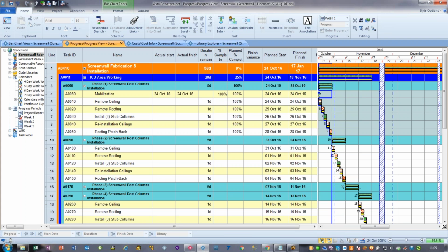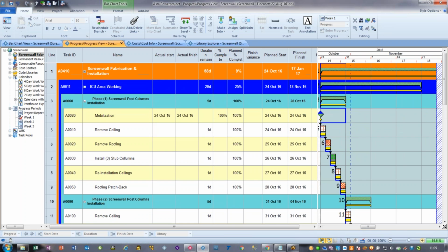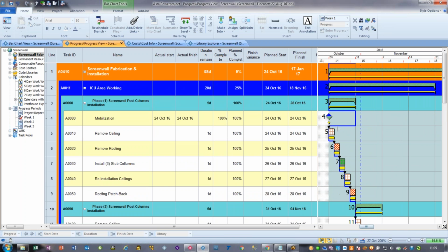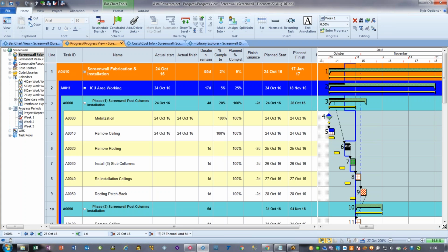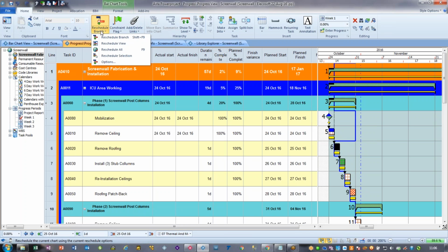And so then you see the top part of that activity, and maybe I'll zoom in so you can see this. The top part of the activity is marked up with the same color as the progress period to show you that that thing is done, and the line now goes across to the 31st. So any activity that's not completed, if I type 100 in there, it pushes the report line to the left. So if I move this, you see, and I'm going to undo that because you've got auto scheduling on,